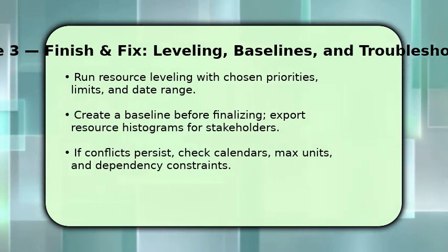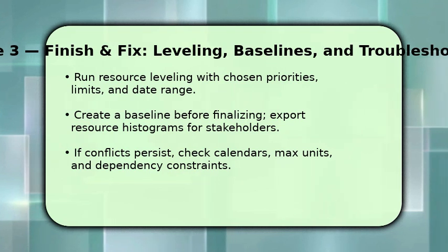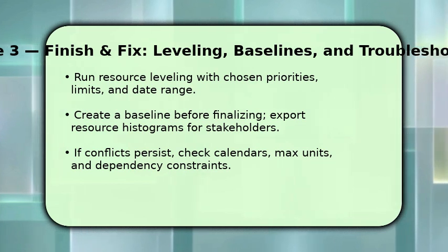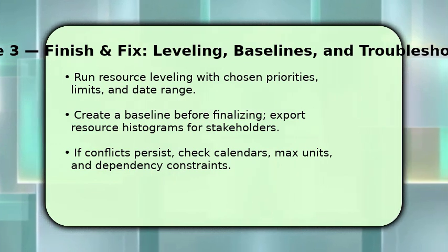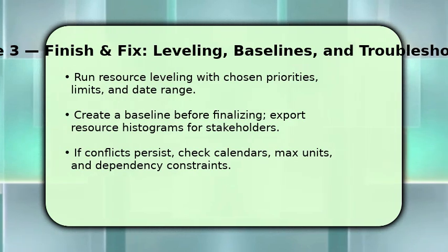If you still see overallocations, verify each resource calendar, max units, and activity constraints. These are the usual culprits. As a troubleshooting tip, if leveling fails, reduce max units or relax constraints, and rerun leveling until allocations fit the available capacity.